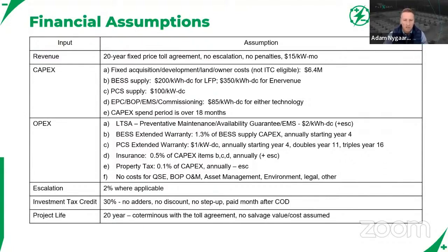And then finally, project life. We're assuming the project ends basically at the same time as the toll agreement or contract. So we're not assuming any terminal value. We're not assuming any residual value, aka salvage value, or any cost to decommission the site.